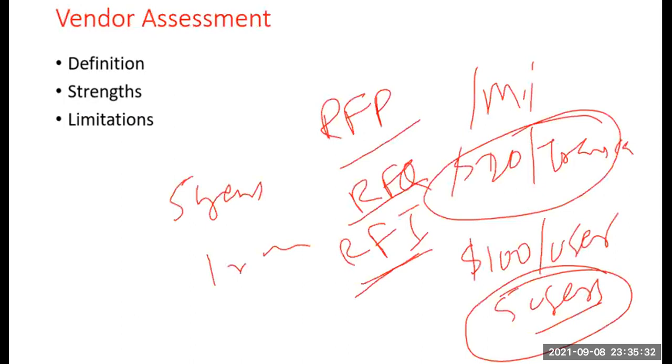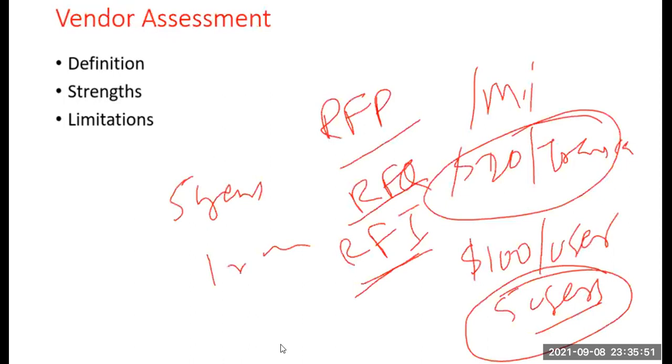So, Ravi, I have a query. If I differentiate this RFP, RFQ, and RFI, it's like first we go for information, that is RFI, then we understand the product and ask for a proposal. And once that is done, then the RFQ, that is a detailed specification as per the requirement, which is for a quotation. Yeah, correct. So RFI, then RFP, then RFQ.